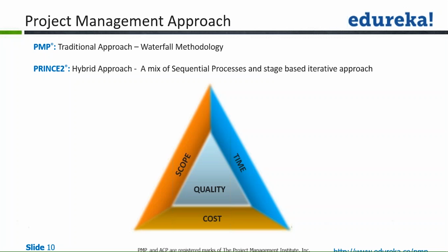Change here is not so easy. It has to follow the change control process. What the traditional approach says is, before you start working on the project, you finalize its scope, you finalize the time, you finalize the cost, and everything must remain intact. If there are changes, you must follow the process and get an approval before you implement the changes.